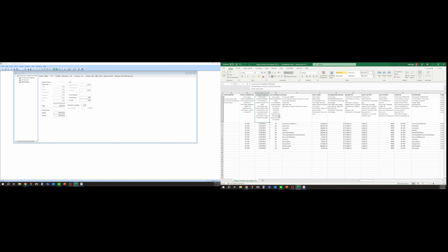They give you an explanation. Is it required? Is it not required? What type of values here? But it's pretty straightforward. ID, name, amount, what the retainage percentage is, what revenue account. So all these things can be defaulted, but you can add as many of these lines as you want right here in Excel, copy and paste in. Once it's done, you save it as what's called a CSV file.